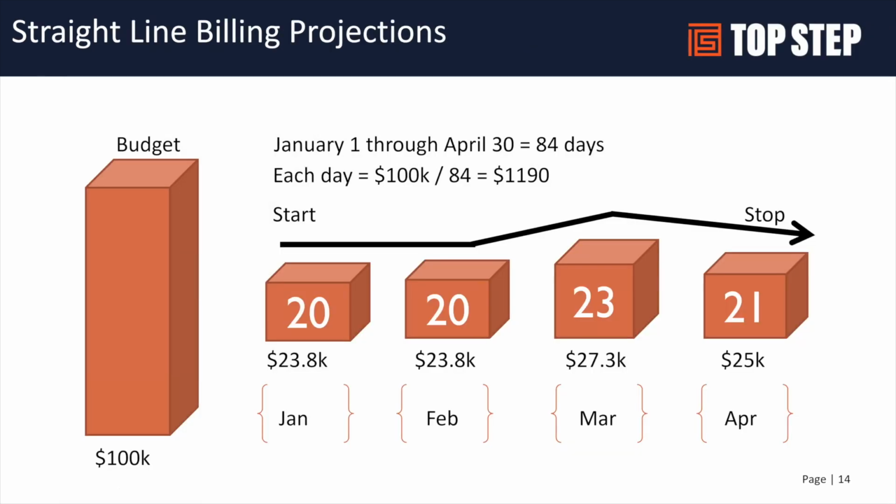Straight line billing projections, these are common, and what we see here is where you're bringing in projects from your CRM very early in the stage, and maybe you don't have a lot of details as to the resourcing plan or the bill rates. You just need to know I have a dollar amount, and I know approximately the start date, approximate the end date, or the duration. And I want to be able to just have a forecasted demand based on those data.